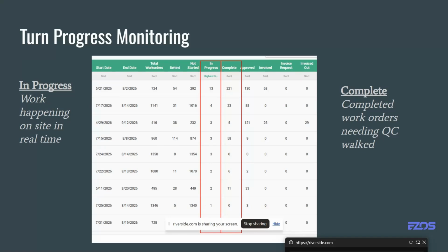If we get past day 3 and 4, the chances of success of the vendors using the system and us being able to track it and see what's happening declines very sharply. So those first 2 days, August 1st, August 2nd, and this is what Lincoln and I also audit as we're watching turns, is if we get to day 2 and I don't have any paints moved or any cleans moved, we're making calls. And so that's something that we really want to watch from the in progress side.